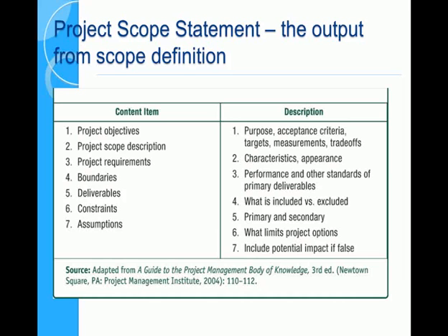Okay, that covers scope. So we had two parts. The definition of scope went into two phases actually. We had the requirements matrix, which is what is it, what are the business needs, what do you want out of this product, therefore what features does the product have, and that requirements matrix helped us define scope in this thing called a scope statement.